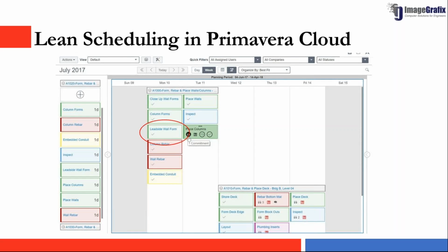What we have, as you can see, is different colors available here for each task, right? You have green color, red color, and blue color. These colors can be assigned to different contractors or different departments in your organization, right? To identify which task belongs to which department or which contractor, and you can plan accordingly, right?